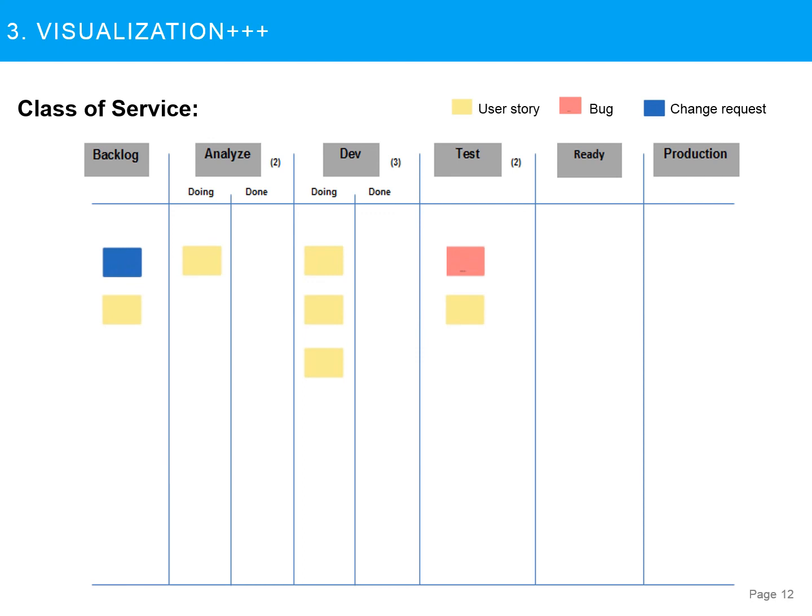In Kanban, classes of service are used to distinguish between the urgency of the work items. Most common ones are expedited, fixed delivery date, and standard. Most of the items follow the standard class. So here the team has introduced another swim lane called urgent. So anything that comes here takes priority over anything and is acted upon by the team straight away.